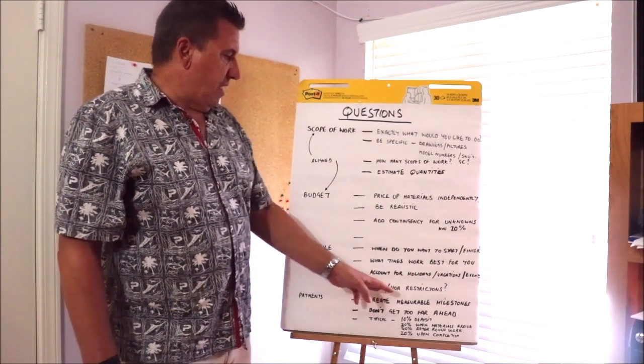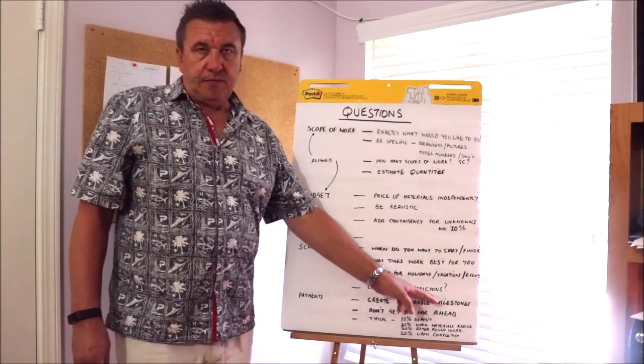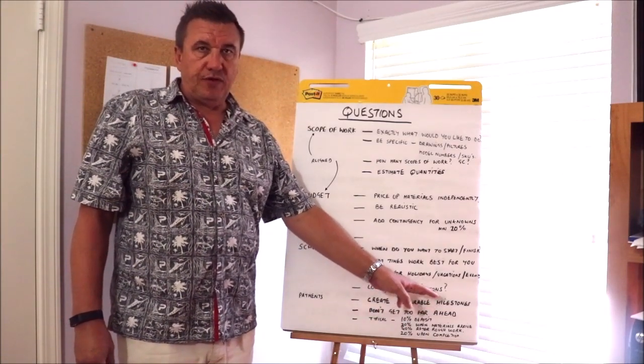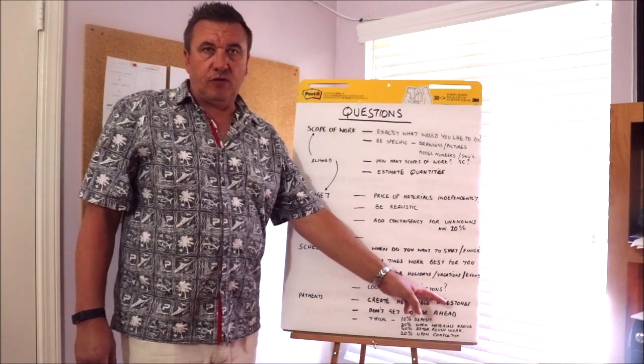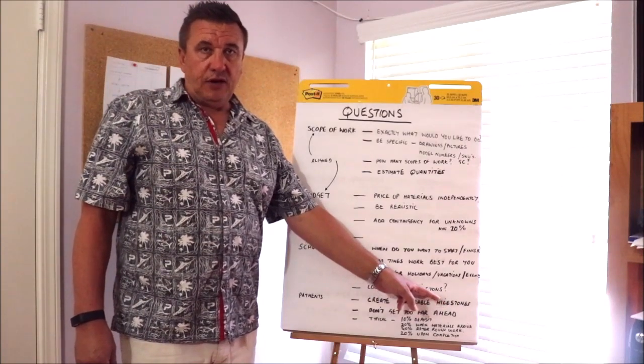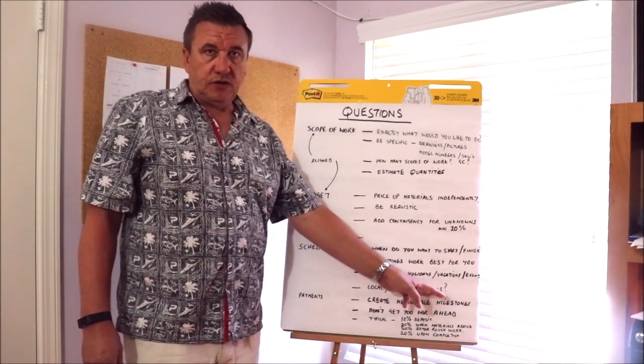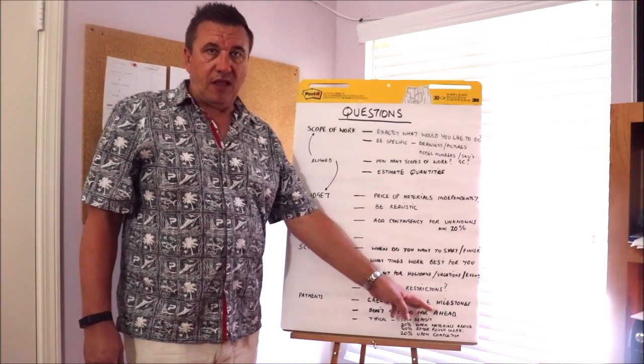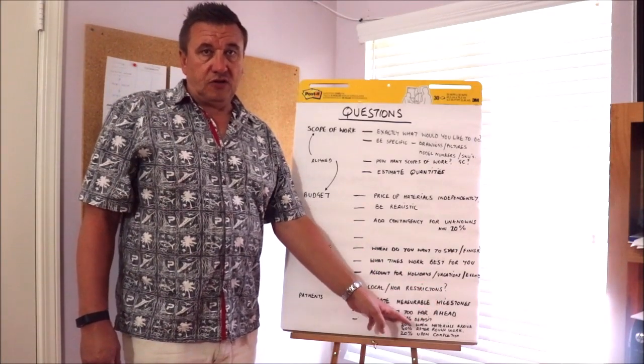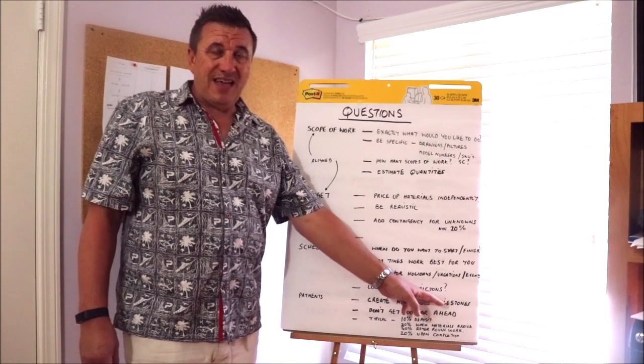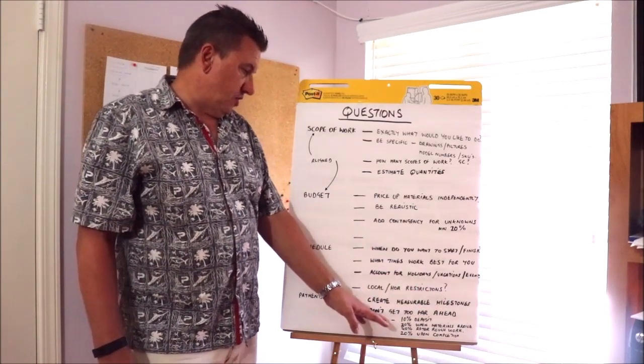This is related to the payments. You don't want to get too far ahead with the payments. You don't want 70% of the work paid for and only 30% of the work done. You've got to make sure that the payments are aligned in a fashion that's going to leave enough money at the job at the end for him to actually come and finish the job.